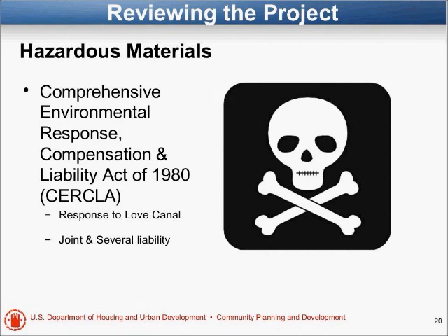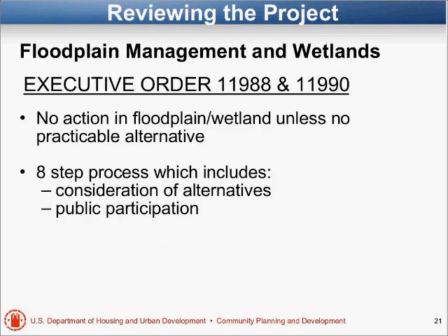And there were some exceptions built into the circular. There was a 2002 Brownfields Act that says if you do due diligence and you're an innocent landowner, you look for the contamination, you didn't discover it, even if they find it, you're not liable.